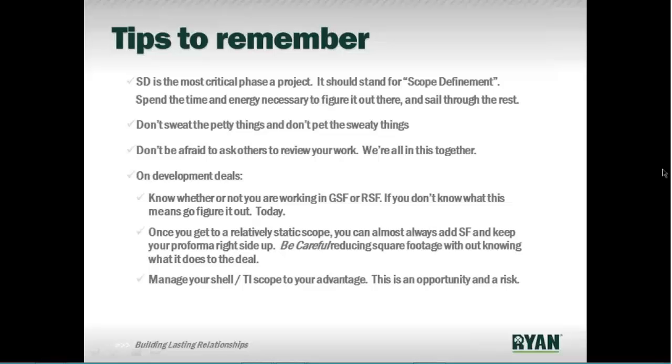SD and DD effort. So how we're thinking in these terms is, your first one is that 1 hour, 2 hour, 1 day, 1 week time frame for developing a cost opinion. And then when you get into your SD and DD efforts, those are typically a 2 to 3 week exercise, and they're more time intensive pricing events.